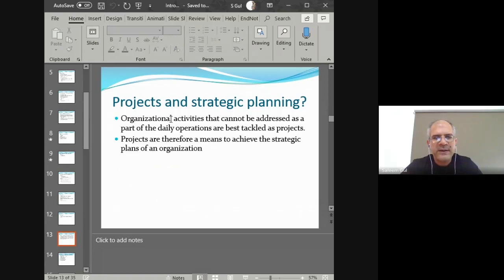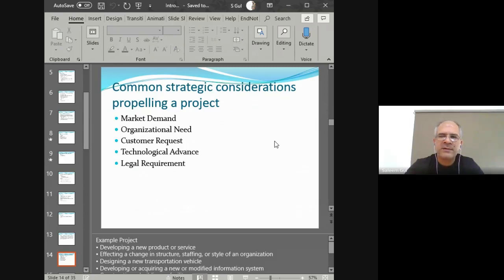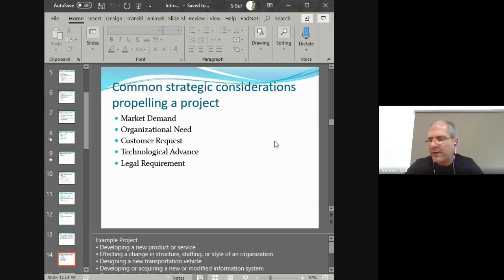Projects are related to strategic objectives and are the strategy of an organization, so strategic planning is an important point here. Why do projects come into being — what propels them? There are five different things. The first is market demand. The general market doesn't come to you and say 'do this for me' — rather you have to survey or listen to the market or guess what it's looking for, and then an organization may decide to launch into a project to cater to that need. Maybe the marketplace of Peshawar is looking for an amusement park, so somebody decides to go into that business.